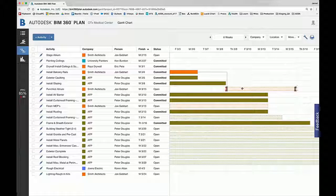But you do ultimately have to have that conversation to say, okay, I'm ready to start up. You guys are not done. Now I've got to push my schedule and bump it. Exactly. I always look at it in terms of concrete pours. If you pour 100 yards in a week, and you can't pour on Tuesday because of the rain or the snow or the weather, then you pour double on Wednesday or Thursday. Why mess up the hard logic when it's really just verbal communication? Right. And this just gives you a little transparency into what that verbal communication was. Yep.